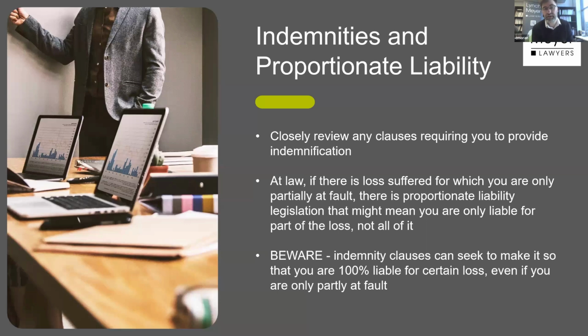Now, as a matter of law, without getting too technical, it's not clear in South Australia whether that's lawfully able to be done, but there is a risk it can be. So I always tend to push back and say, no, we don't want the proportionate liability legislation excluded. The other side always say, in my experience, we do want it excluded. And generally, my contractor clients are happy to just go, I don't want to fight about it. I'm not super clear on what you're talking about. Let's just leave it in. And so part of my challenge is to explain these somewhat complicated concepts so that people do fight a bit harder to keep the proportionality in the contract.